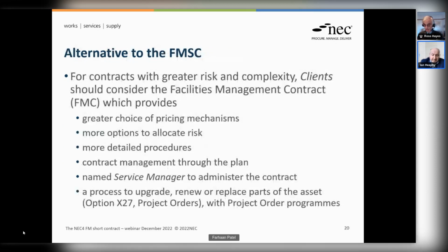Okay, thanks, Ross. So just moving on again. We've talked today about the short form of the facilities management contract. There is also the full facilities management contract, the FMC. So if you do think that your service needs more sophisticated management techniques, you want a greater choice of pricing mechanisms, things like target cost, cost reimbursable, you want more options, ways of reallocating risk between the parties, you need to maybe look at more sophisticated management requirements, things like mobilization plans, demobilization plans, etc., then it may be better to select the FMC, the full contract.